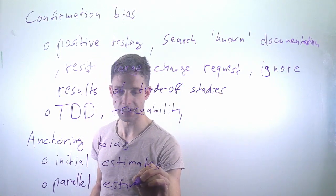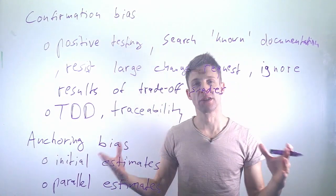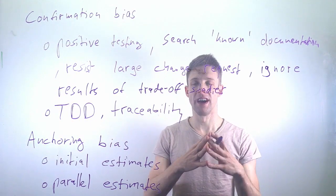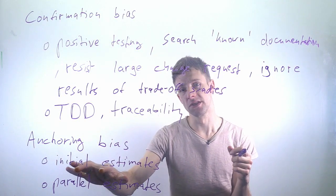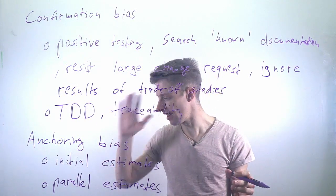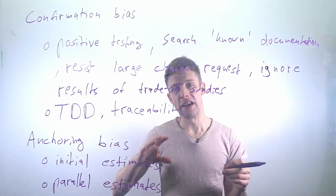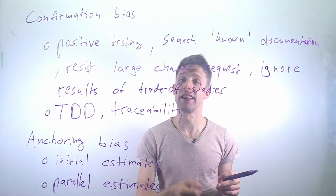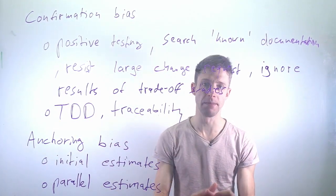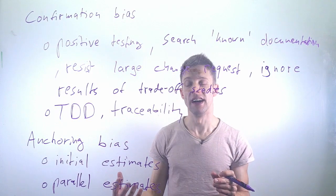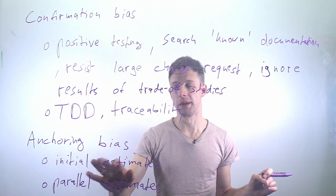Techniques that address this include parallel estimation. In agile development, there's a practice called planning poker where the scrum or XP team simultaneously reveals what they think a task or user story will take. Everyone says at the same time 'I think it will take two weeks' or 'I think it takes one week.' If one person would say 'I think it takes six months' first, all the others would get anchored to those six months. Doing it simultaneously reduces that risk, giving you a broader spectrum to discuss.